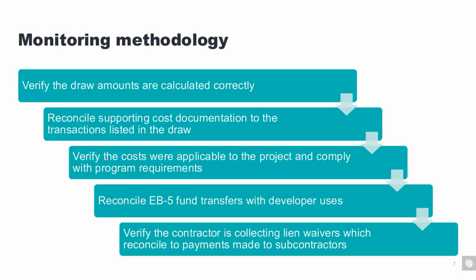The reason for that is that so many of the reporting modules that are used to create construction invoices and related documents are built on spreadsheets. And all of us that are well-versed in using spreadsheets recognize that it's not difficult to break a formula, to cut and paste something, and then all of a sudden, the template that worked great for us last month just doesn't work quite as well as it does this month. Consequently, when we are verifying draw amounts, it is critical that we go back and verify those calculations.